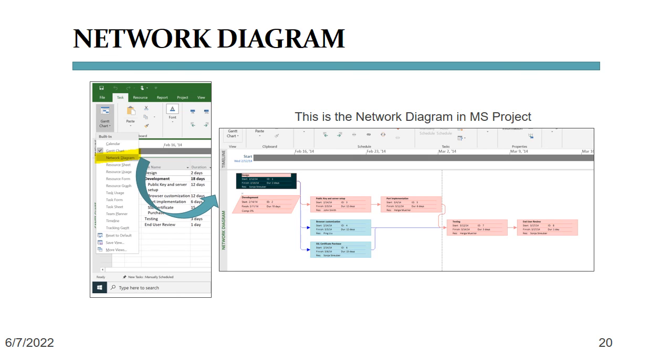Now, notice how some tasks are red and the others are blue? If you guessed that the red tasks are the critical path tasks, you'd be right. No more forward and backward passes to calculate. The software does that for you. ProjectLibre contains similar functionality.